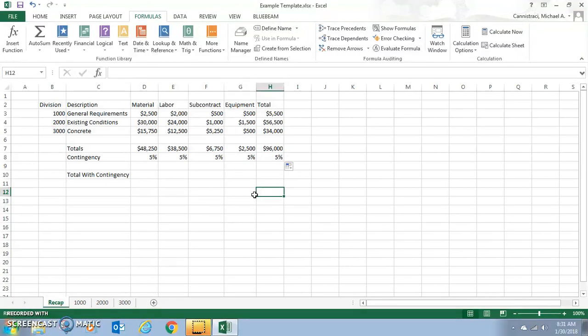At an early stage of design, you may carry a higher design contingency, but by the time the drawings come out to bid, that might go to zero. But if it's a renovation project, you still want to show that you're carrying construction contingency in case you find any of the good kind of insulation, that starts with an A and rhymes with asbestos, in the walls.